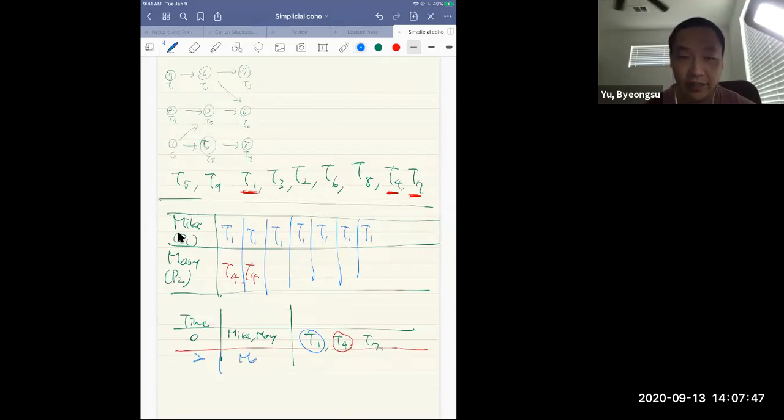now Mary is free, right? So Mary needs to do another task. And at this point, what we completed is T4 only, right? So you can just delete T4 from your diagram. Then T1 is done by Mike, so you cannot do T1 at this point. And T5 requires you to complete T7, so you cannot do T5 at this point. And definitely T2 cannot be done at this point. Also, T8 cannot be done at this point because T7 is not completed, right? So the only available tasks which are ready is T7, right?